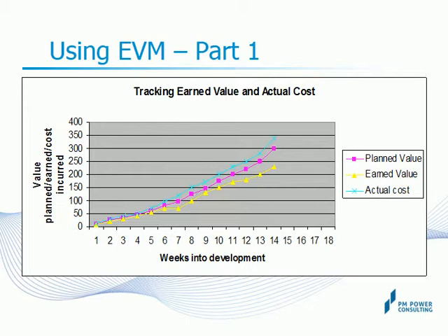Next, as the project progresses, EV and AC information can be gathered on a regular basis and represented as a cumulative value in the same diagram. EVs and ACs for the project are arrived at by summing all the individual EVs and ACs of various tasks being worked upon by the project team. EVs need to be assessed based on objective completion criteria, as we did in the earlier example.